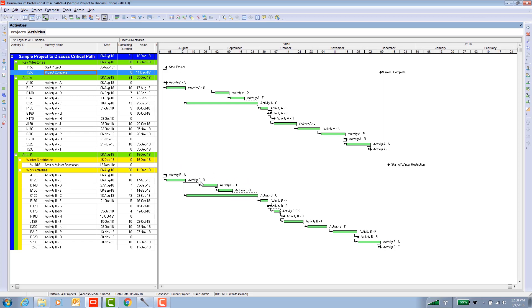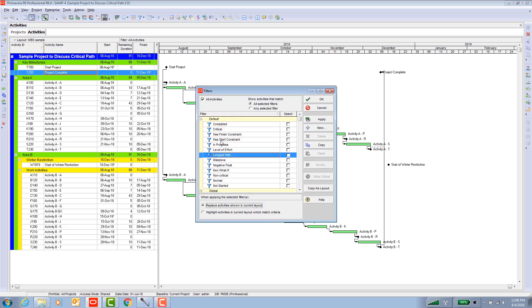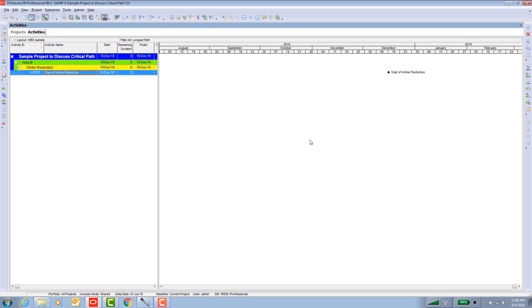By visual inspection you would expect that when we ask what the longest path to this project is, it'll go somewhere through area B and up to the final one. There are some built-in functions in Primavera P6 and the first one is called longest path filter. This is a filter that's available in the default section titled longest path. Let's turn that on and see what happens.